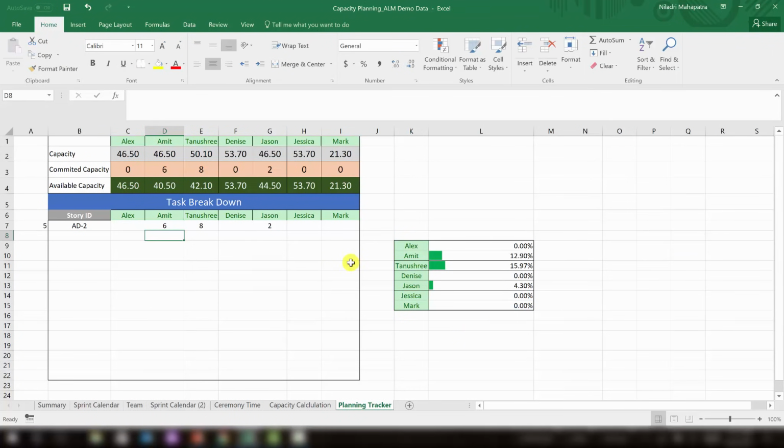So this is the Excel I have prepared for capturing your capacity consumption during the sprint planning. The Scrum Master normally does that, and updates the tasks. All developers, if they have a laptop, can create their own task, assign it, and at the end say, okay, this is our task hours. If they don't have a laptop, most places nowadays have one, but in case you don't,